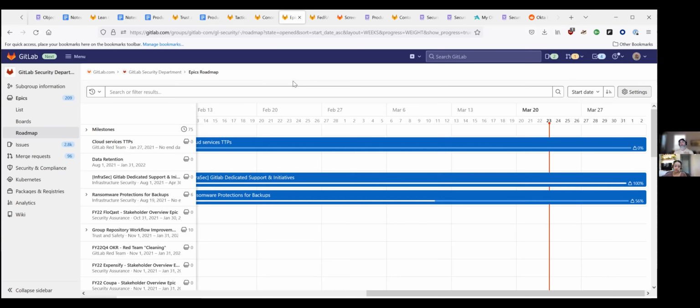Typically, it's your program leadership or external stakeholders who are looking to see how it affects them, because they may have other timelines, other efforts that are going on, and they're seeing whether the things are still going to lay out as intended. I'm looking for collisions. If I'm a department head and there's other things going on, I'm looking at where slips in one project's timeline may be affecting resourcing or budget for another project's timeline, and do I need to adjust? So that's where those roll-ups kind of play into effect.